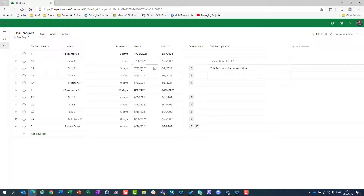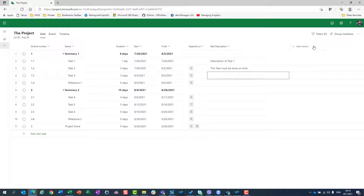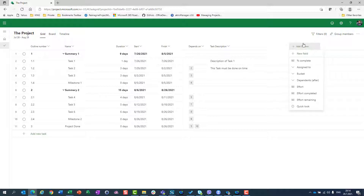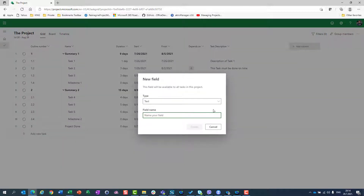Now, since I have Start and Finish, maybe some of those tasks are going to be late. But what if I have a Critical Deadline? It means the task must be finished before or on that Critical Deadline. So I'm going to use New Field and of course I'm going to use Date, and I will call it Critical Deadline.